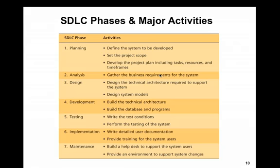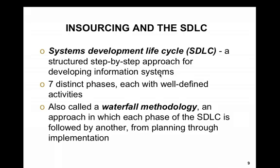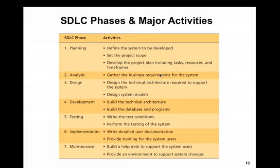The development lifecycle is kind of like project management, but it's managing the development of software specifically. You break it out like a project plan — those seven steps are activities that need to be performed. It standardizes things and makes it almost like a template for the development team to follow. In step one, the planning stage, you do feasibility studies, forecasting, estimating, costing, and planning. You define the system to be developed, set the project scope — what features it will have — and develop the plan including tasks, resources, and time frames.